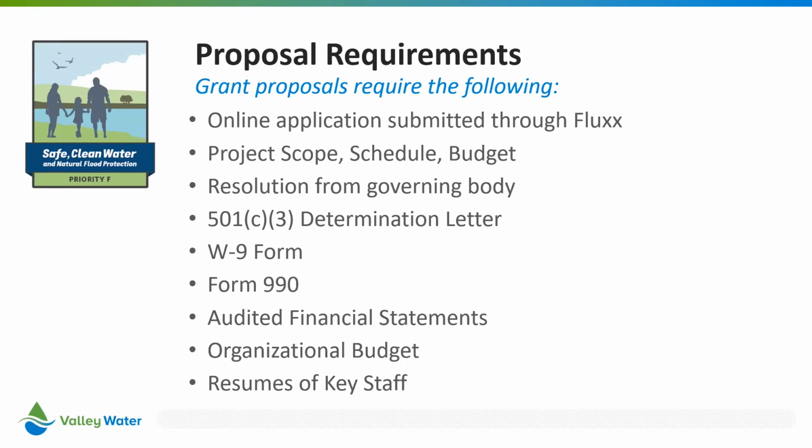Hi, thank you. Is this a fee for service grant? In other words, it's all reimbursement. You don't get the grant amount. You have to invoice you all to get paid back. Is that what I'm hearing? Yes. The standard grants are all reimbursement based. So we don't give any funds up front for standard grants. For our mini grants and our refill station grants, which we can talk about later on in the presentation at the end, those do provide 50% of the funds up front and then 50% after the projects are completed.